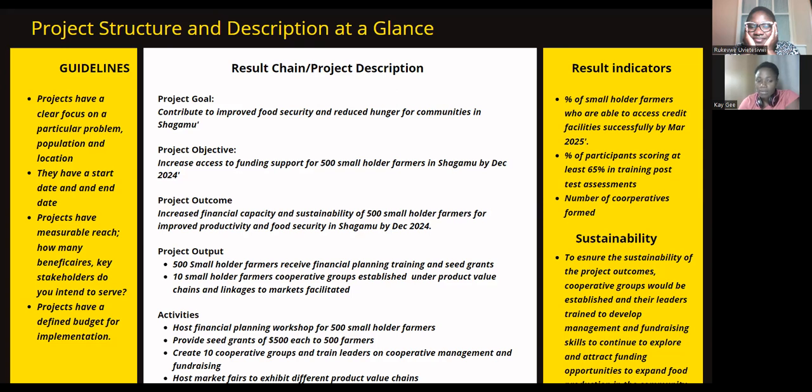Sorry, are you talking about input or output? Because those are two different things. Input. The log frame has the rows and the columns. And then impact. Some funders will say impact or overall goal, and then objective, outcome, or request you to provide both objectives and outcome in the same proposal. And then you have output or expected results, and then activities and input. So she's overwhelmed with all of these terminologies, what they mean, and what information you are expected to provide.